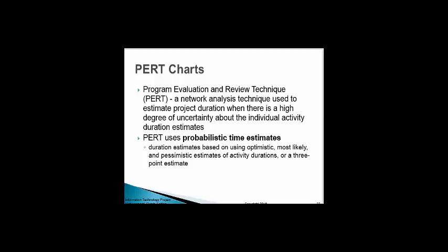And then we're moving on to our PERT chart, 6.7K, which is another type of network analysis, program evaluation and review technique, PERT, P-E-R-T, network analysis. And it uses the probabilistic time estimates when we talked about having the three estimates, the pessimistic, optimistic, and our most likely estimates.